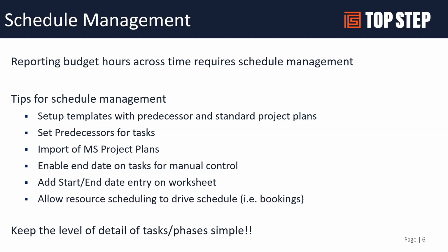You have the option in project plans to set predecessors. And when I think of predecessors and task structure, I do think of Microsoft Project, probably the most popular tool out there. OpenAir can mimic some of what Microsoft Project does in those cases, but be careful. We try to direct customers to really use OpenAir as is, not quite the level of detail that you normally would see in a large project plan, but enough level of detail to be able to capture where time needs to be captured and what deliverables need to be delivered.